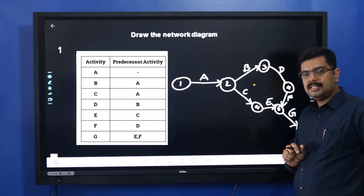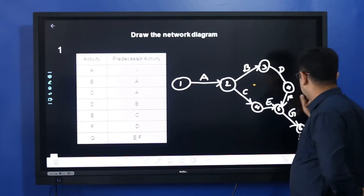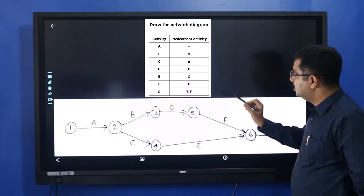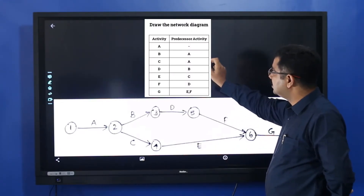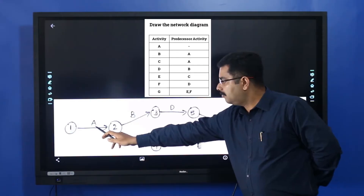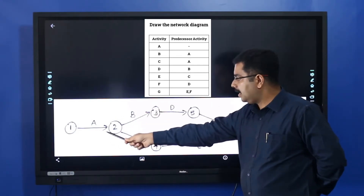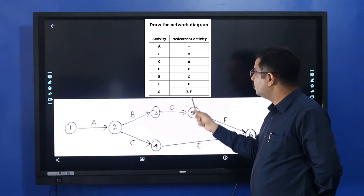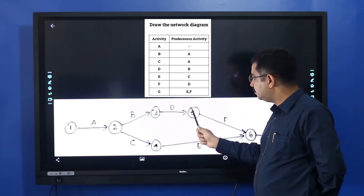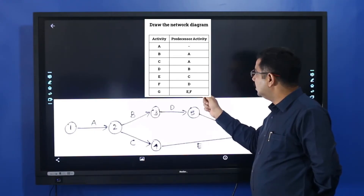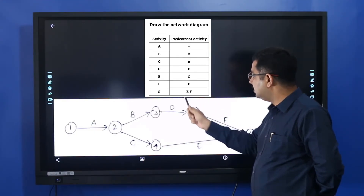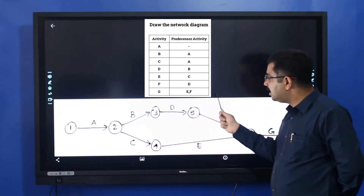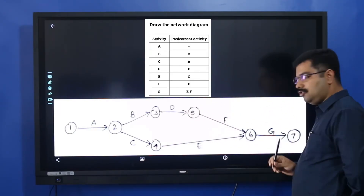This is how you draw this network diagram. You have the predecessor activity, you draw A. A leads to B, A leads to C, then B leads to D, C leads to E, D leads to F, and E and F join together to give G.